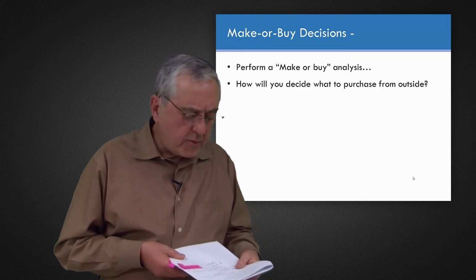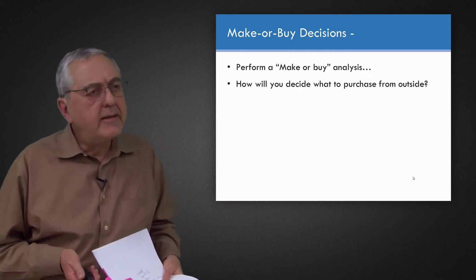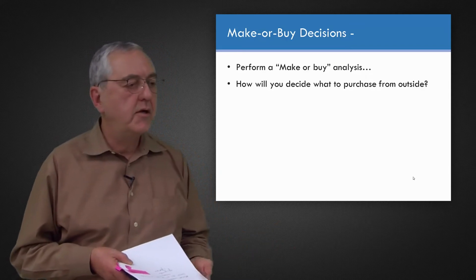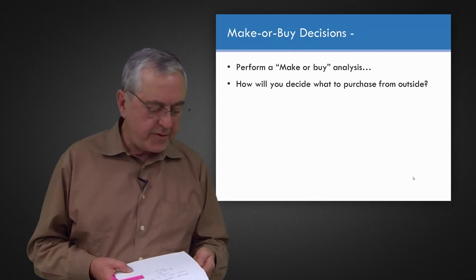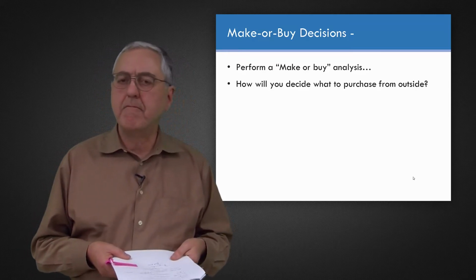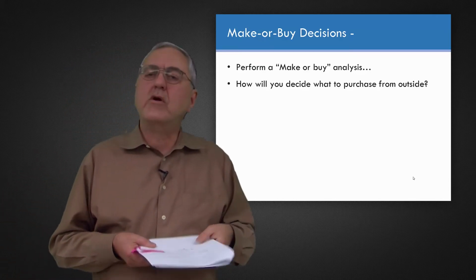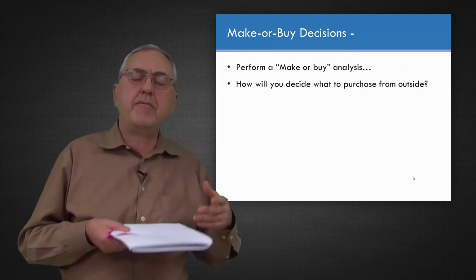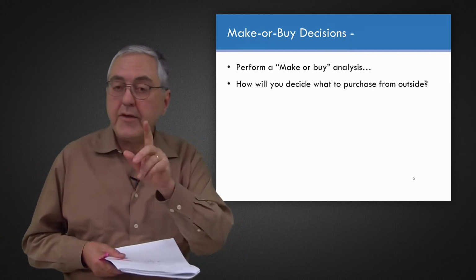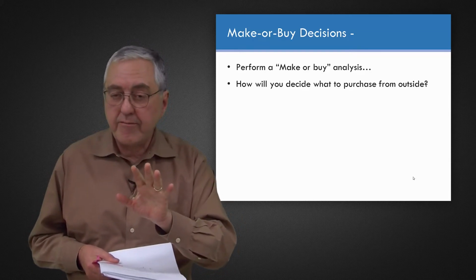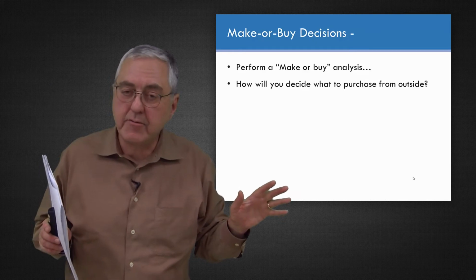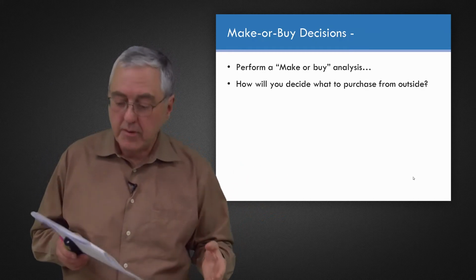What about intellectual property and proprietary rights? Maybe you do sophisticated engineering work in, let's say, space robotics, and you're developing a camera for use in a very harsh space environment. And maybe there's a component of that camera that you don't have too much experience in, but you think, well, maybe we should go to, and we're rather pressed with the people that we have. All our people are busy. Maybe we should subcontract that out to a supplier to ourselves. Well, one thing you're going to consider is, would that involve your supplier learning about your proprietary processes and designs that you would prefer to keep secret? If so, maybe you'll make a point of doing it with your own people inside.